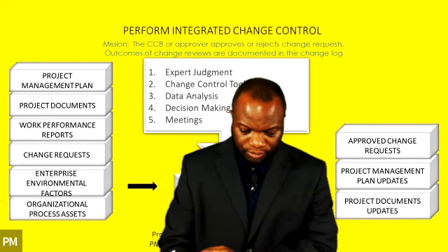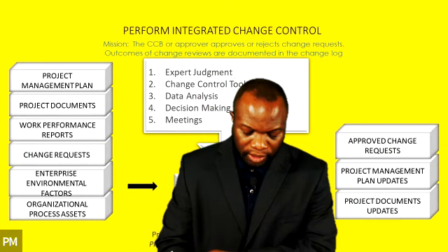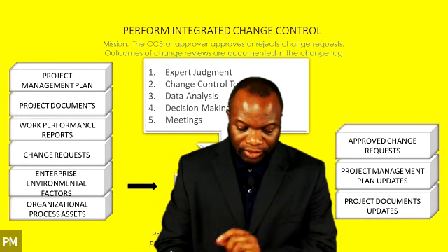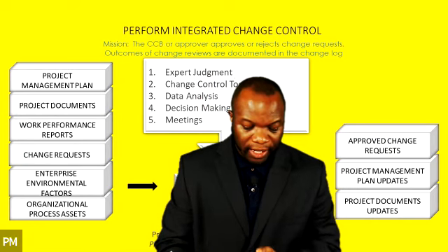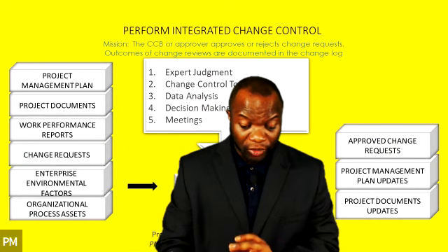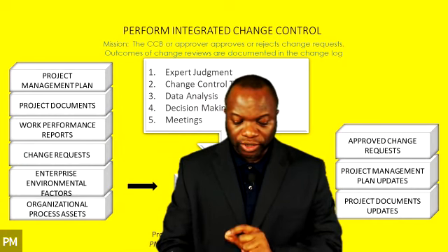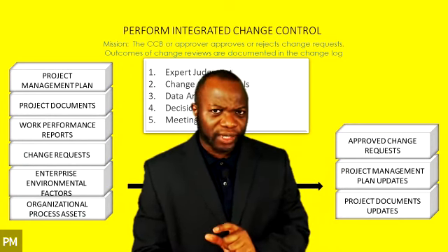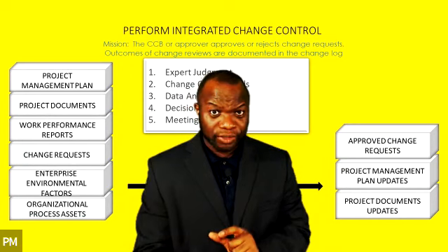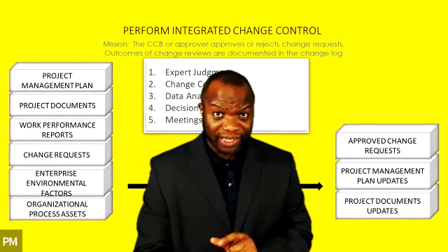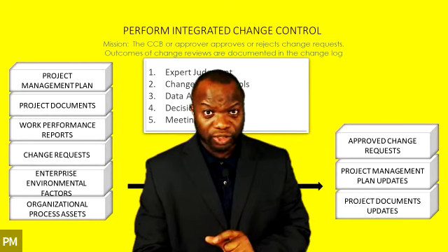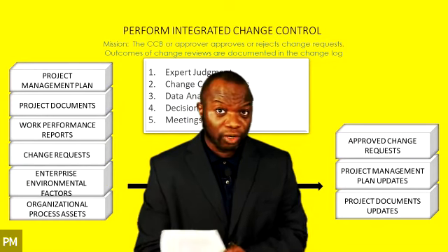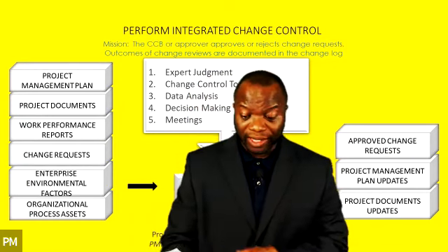It's important. Okay. And then on the fifth line, the word always there is important. It says, whenever a change request may impact any of the project baselines, this is from line 4, a formal integrated change control process is always required. Do you get what I'm saying? Is it making sense? I hope it's making sense. Give me some assurance that it's making sense to you, because page 115 is loaded. We ain't even started talking about the ITTOs.